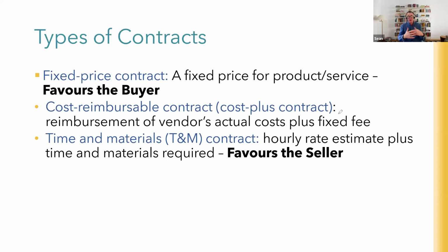Plus, we'll probably agree on a maximum spend, and if we bring it in under that... So on that $20 million urban redevelopment project, the main contractor was entitled to, it was actually generous for them, 70% of the underspend. So they actually took home a $1 million bonus. I remember having to approve that invoice, $1 million, because we came in $1.5 million under budget. So you have these sorts of things around it as well.